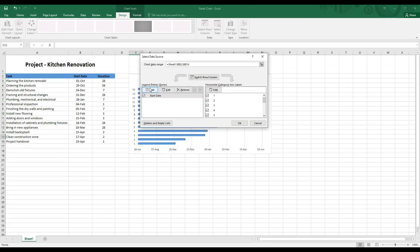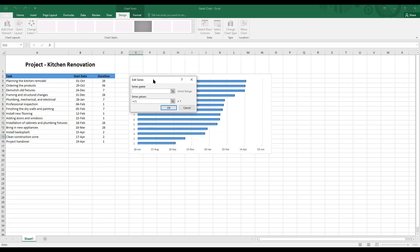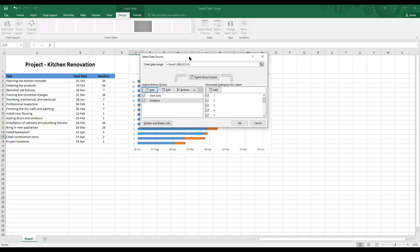Next up, I'm going to add the duration. For this, click on add and repeat the process from the previous segment. Under series name, click on duration header. And from series values, remove the default value and highlight this column like so. And click on OK, you can see the changes in the background.